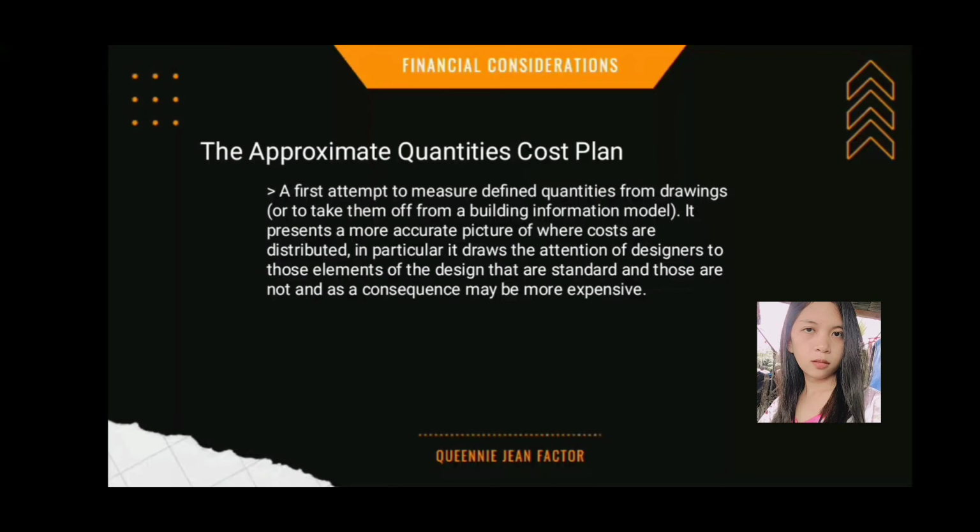In particular, it draws the attention of designers to those elements of the design that are standard and those that are not, and as a consequence, may be more expensive. Approximate quantities cost plan should be accompanied by a schedule of assumptions made and perhaps a cash flow projection. A pre-construction whole life cost plan may also be prepared. Approximate quantities cost plan should form a solid base for an effective value engineering exercise.